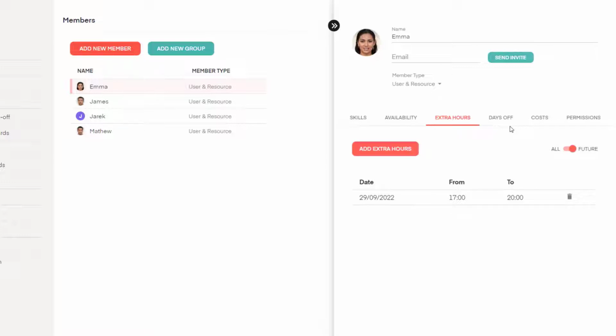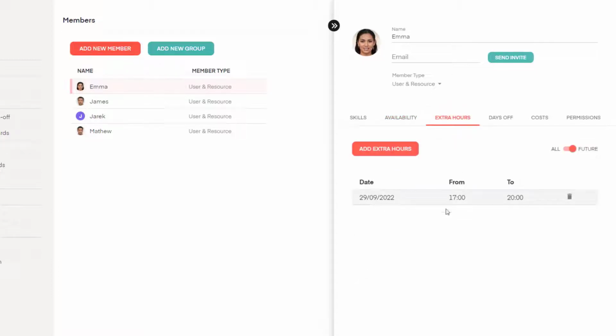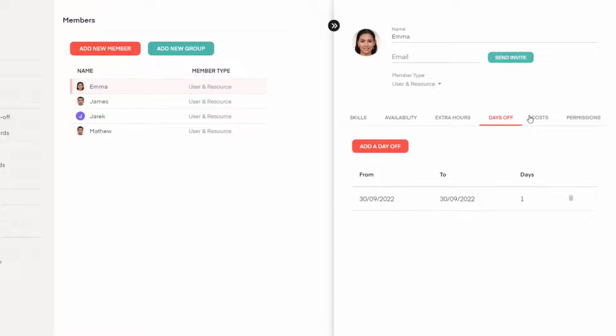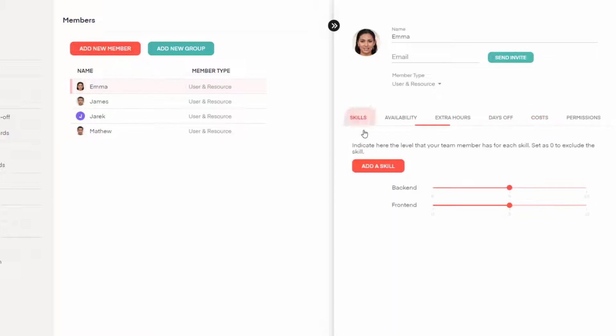For example, in software developer companies, very often there are releases on the weekends. Normally, a weekend would be a non-working day, so we wouldn't have anything here, but this is an extra working day, so we are able to add it here separately as a one-time event. We can add days off, and some other things that we won't cover fully now.